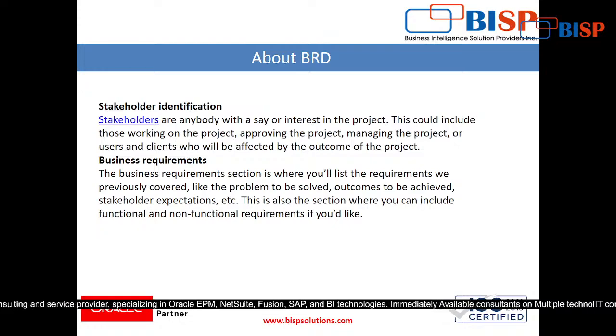So we have to take care of stakeholder identification, that those who are interested, we have to identify those people, and when we create our BRD, we have to take the sign off from them that this is the BRD, what you are using, what we are providing you after the implementation, how your business is going to work. Everything is defined in this. Now please approve it. So once they approve it, then only we will be able to start the project implementation, right? Then the stakeholder identification is done.